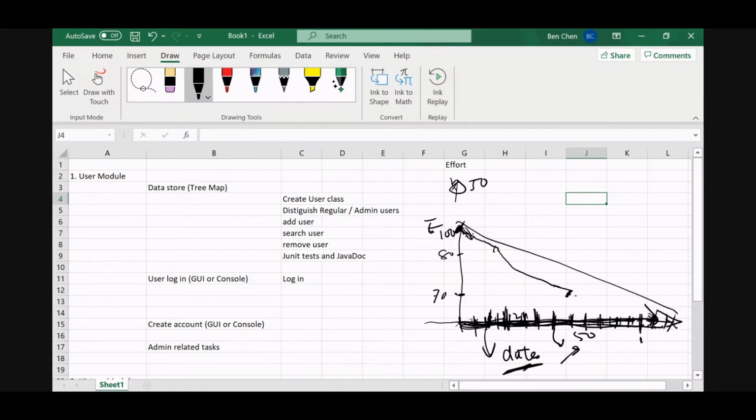Because you are not doing this full-time, you have other classes, you have other work, a part-time or full-time job on the side, it's probably a good idea to use hours rather than days. At a workplace, when you work for a company, days are reasonable. 1 day's work, 2 days' work, because you go to work for 8 hours.